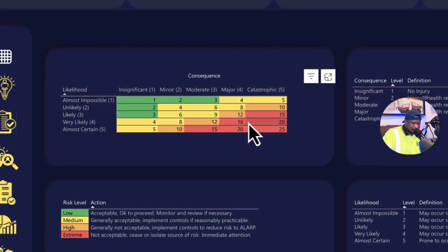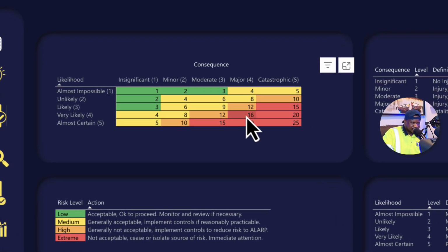Now take note that within this risk level or this range, there is a minimum value, which is the minimum threshold. So within the risk ratings, the minimum threshold for extreme, which we've defined here, right? The extreme is here, the high, the medium, the low. The minimum threshold is 15. Once you get to 15, every risk level within this range is extreme. So 15 divided by 25, right? If I do the calculation, we have 0.6 times 100, that's 60%. So if you have a risk score equal to or greater than 60%, you are within the extreme.